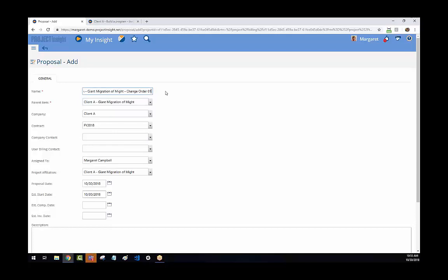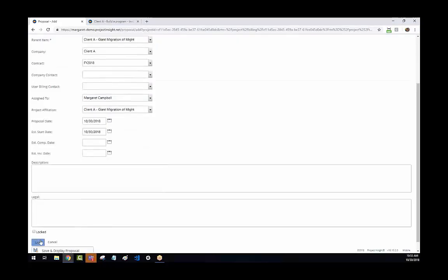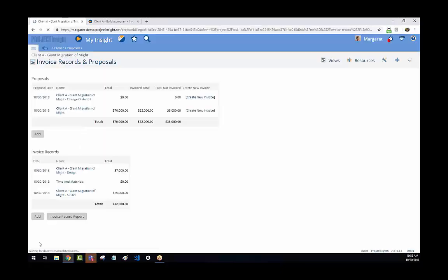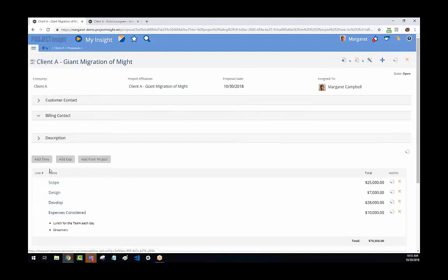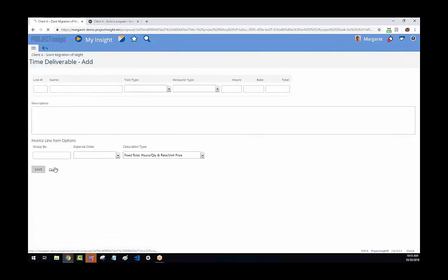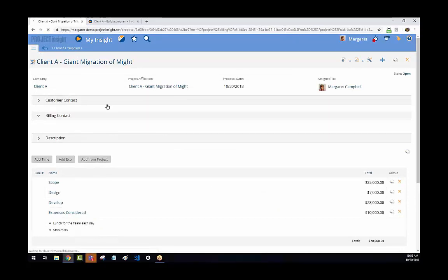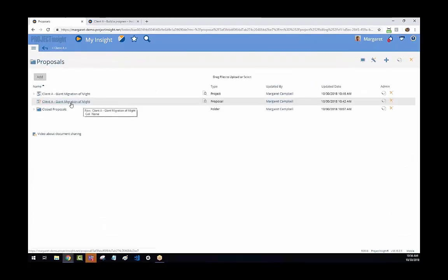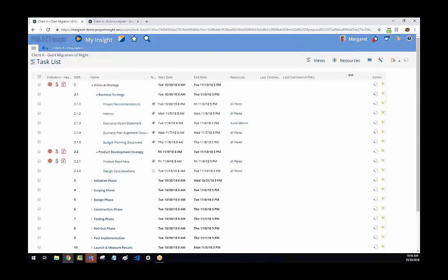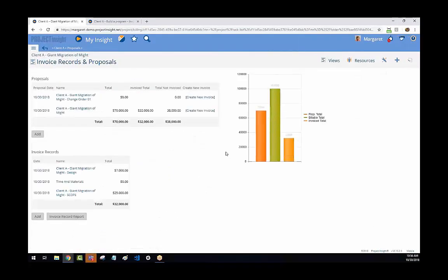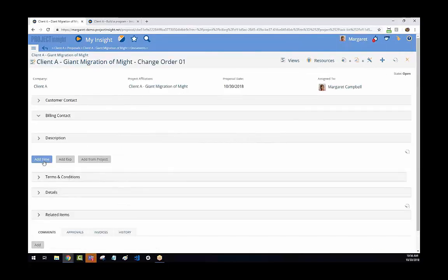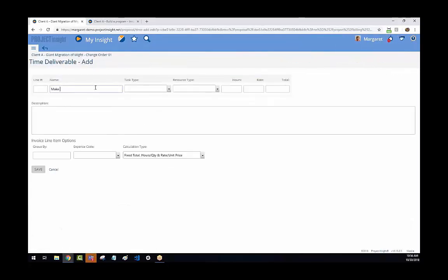You'll say, okay, well, in this particular case, you'd like us to change, nope, that's the wrong one. Into my proposals. So in this particular case, you'd like us to make a change to make it blue instead of pink. That's actually going to cost you about $4,000 worth of change. Do you agree on this, yes or no? Do you really want to spend the $4,000 to change the color?